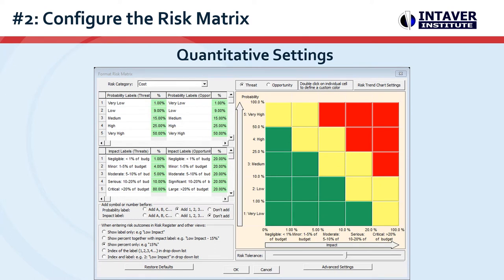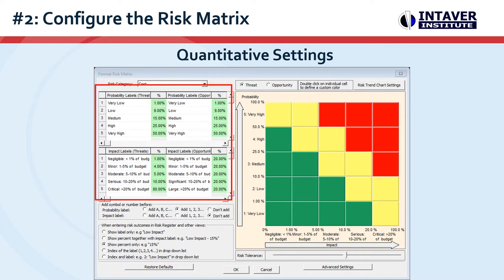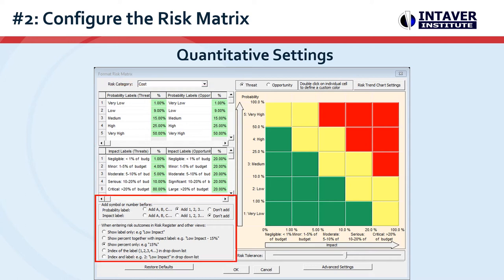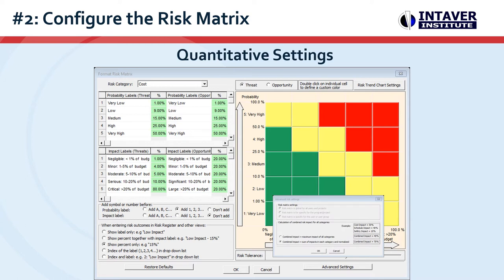For quantitative risk analysis, we recommend the following settings. The default ranges are not compatible with quantitative analysis. Therefore, the ranges for probability and impact should be more reflective of the severity of a risk. For example, if a very low probability equals 1 in 100, its range could be entered as 1%. Input type is show percentage only. This will allow you to enter risk probability and impact as a percentage. Risk scoring in the advanced settings is sum of all risk in each category and normalized. This will provide the most accurate rating, and the score will be in a percentage.